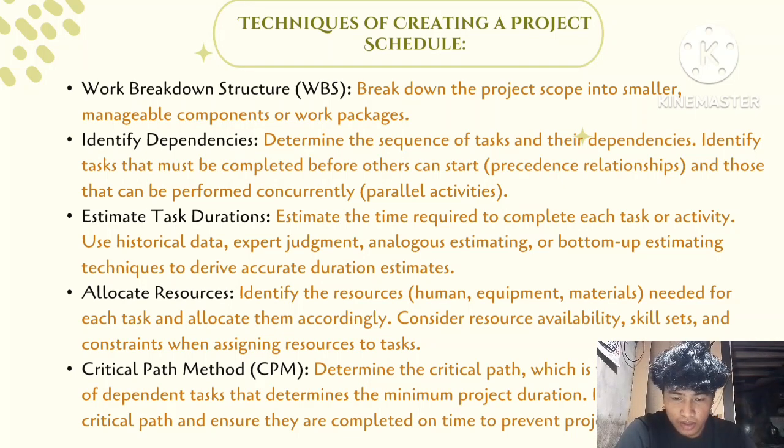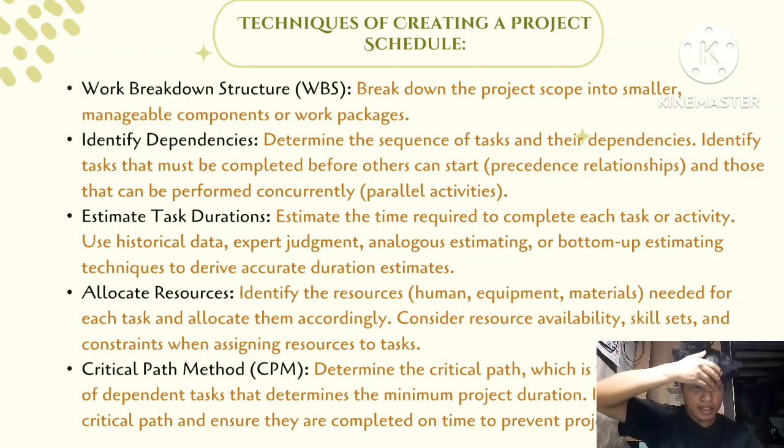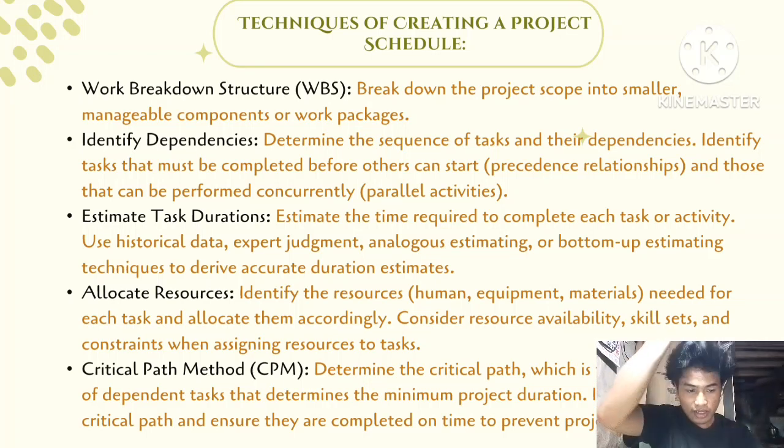Critical path method, or CPM. Determine the critical path, which is the longest sequence of dependent tasks that determines the minimum project duration. Identify tasks on the critical path, ensuring they are completed on time to prevent delays.